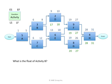Activity E is a little trickier. I'm asking what's the latest E may finish for F to start by day 19 and G to start by day 20. I look at 19 and 20, take the smaller number 19, and subtract 1. The latest E may finish is day 18. What's the latest E could start? I take 18 minus 6 plus 1 and get day 13. This means the latest E may start is day 13, with a duration of 6 and a late finish of day 18.